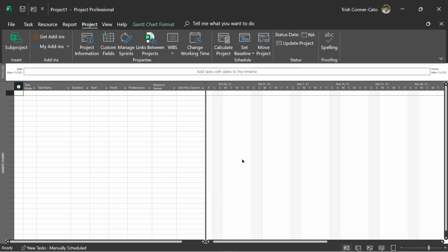And the other thing that you need to know is the calendars in Project, even the one that we created based off of the standard calendar, ignore Saturdays and Sundays. So no work will ever be scheduled on a Saturday and Sunday unless you override the system and tell it to do so at a task level. The last thing we're going to do right now is save our file, and then I'll show you how to attach the calendar to your project plan file.